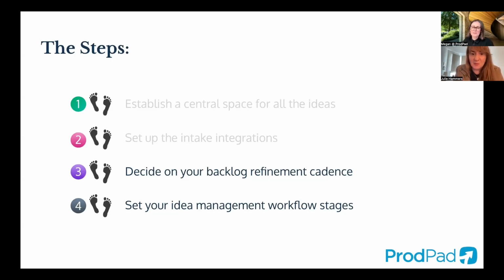You need to decide what cadence you'll keep, whether you want to do this daily, weekly, bi-weekly, just be consistent. Give yourself a calendar meeting slot where your team is going through these things together. If you're working as a team, it can be helpful to have some PMs pre-triage items, and then there's a vetting process to decide whether something will move from that reviewed state or definition state into more full discovery.